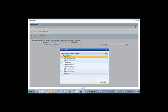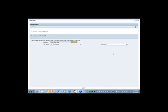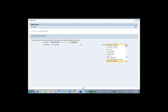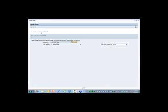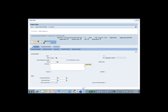So let's go ahead and introduce this idea. So we'll say this is a fresh product idea. I'm also going to give this an item type. So an item type is going to define for me what the stage gates are and what kind of projects I can link to. In this case, I'm in a demo system, so there's a whole bunch of different ones. But I've set up a couple here. One is I have a full new product introduction process. And then I also have a fast track process. These would define different stage gate requirements. Let's go ahead and select a full NPI process and hit create. And this is going to give me really the shell that I'm going to use to start defining my idea.